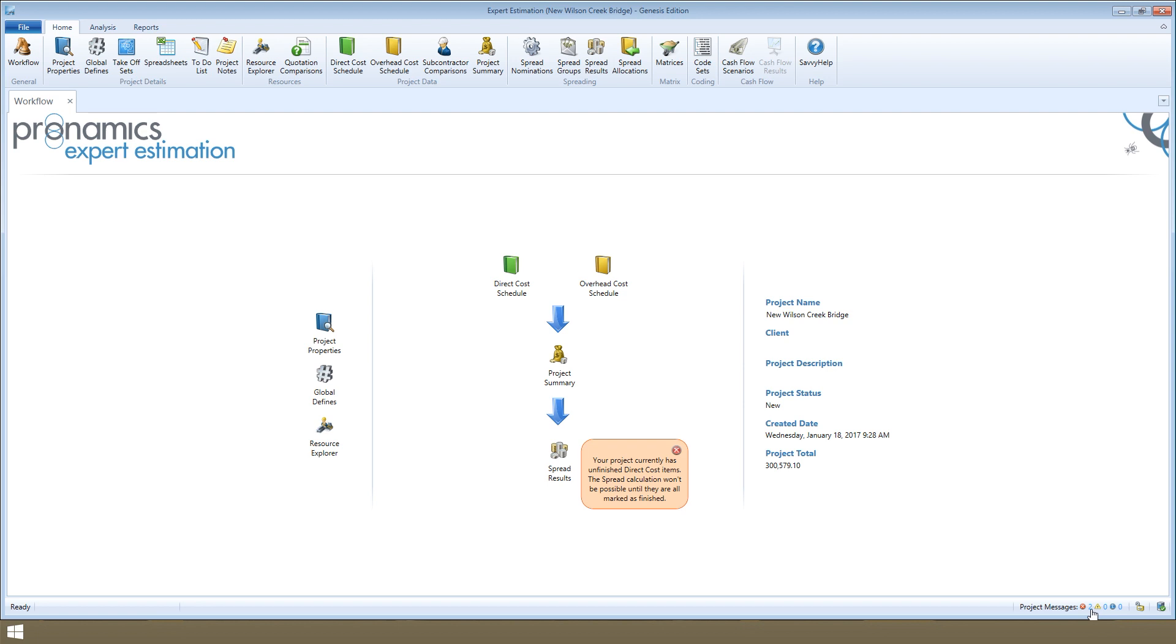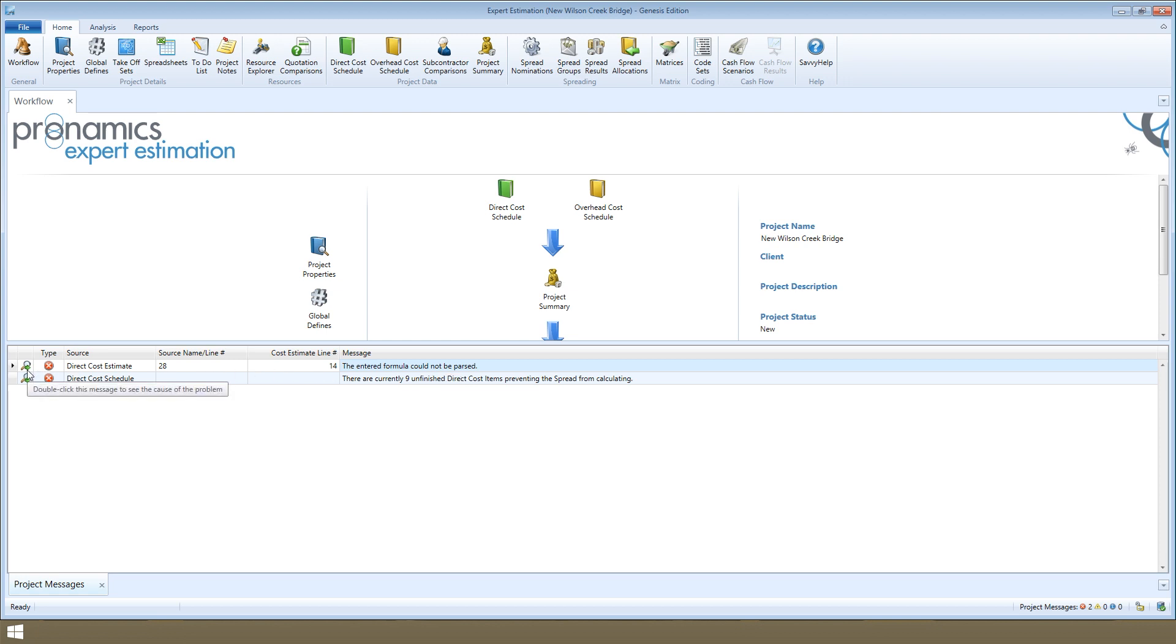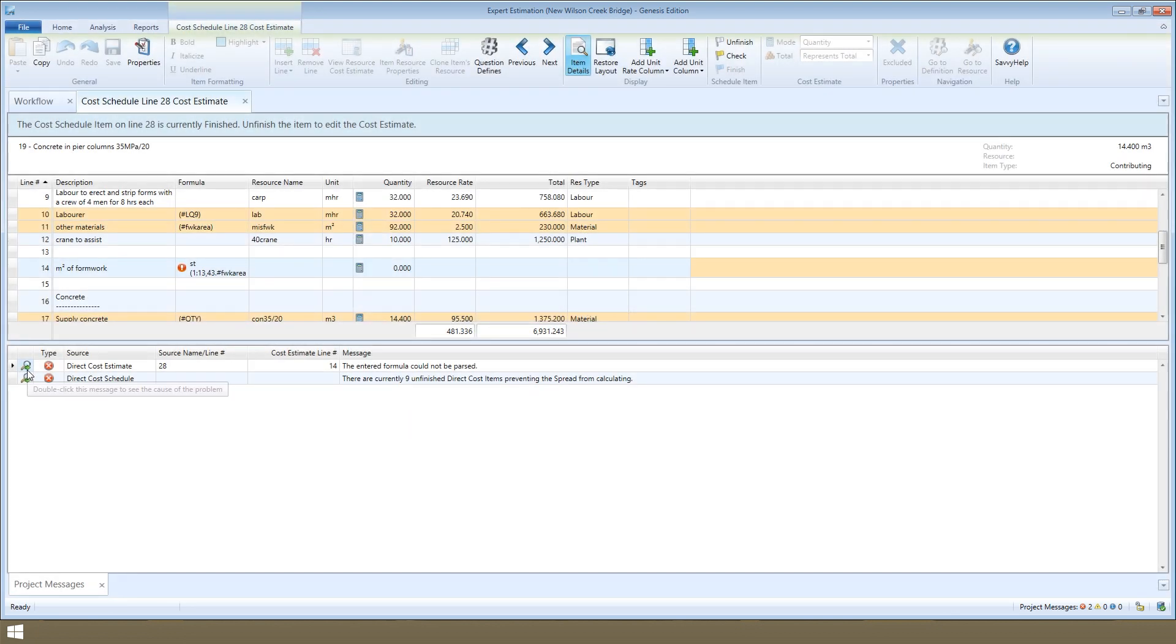You can access these anytime by clicking here in the bottom right hand corner. Errors which will stop the spread from running include unfinished items, because this means we haven't yet finished pricing up the project, and also any formula errors in any cost estimate. You can double click the magnifying glass here to navigate straight to the source of that project message.